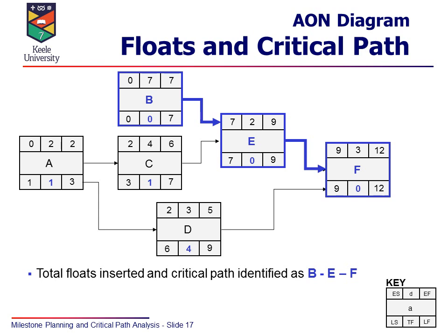Please note, I didn't probably stress this in the lecture, but now you're more sophisticated users of network diagrams. You have to appreciate that if you've used up a day of slack for activity A, then that means that suddenly further downstream that day of slack is taken out. And so activity C, if you have delayed that by a day, that reverts back to a 0, and then activity C suddenly becomes critical as well, because you've delayed it by a day. You're not getting there till day 3, so all of a sudden, because it takes 4 days, it's got to finish on 7. That then becomes critical.